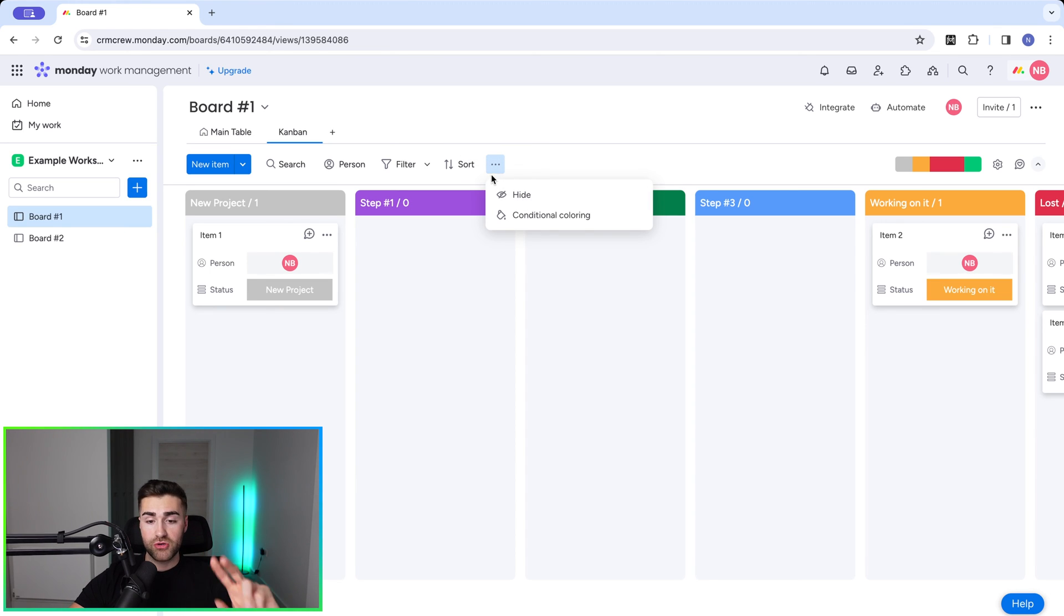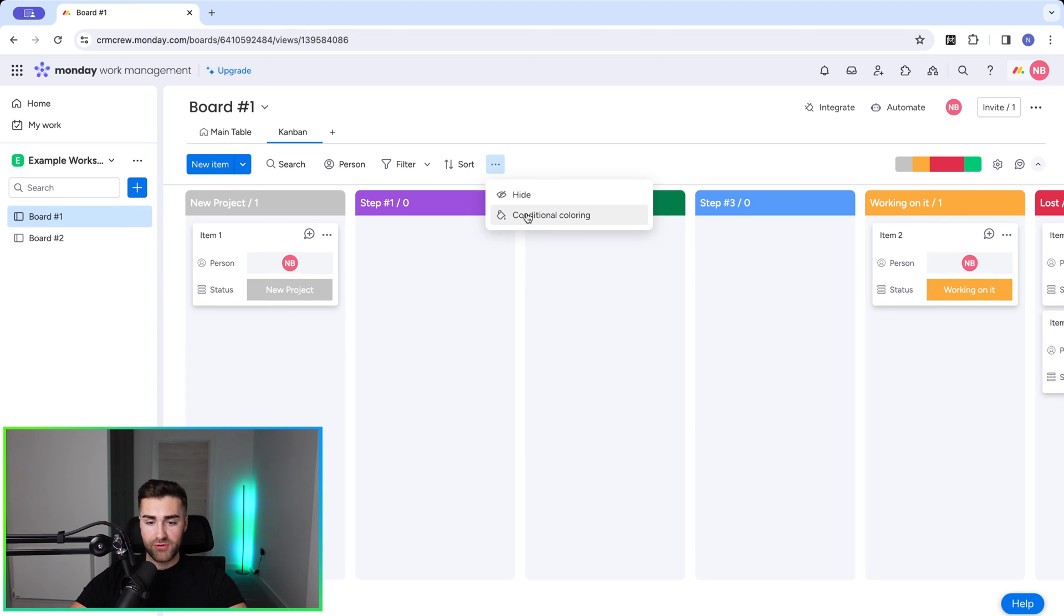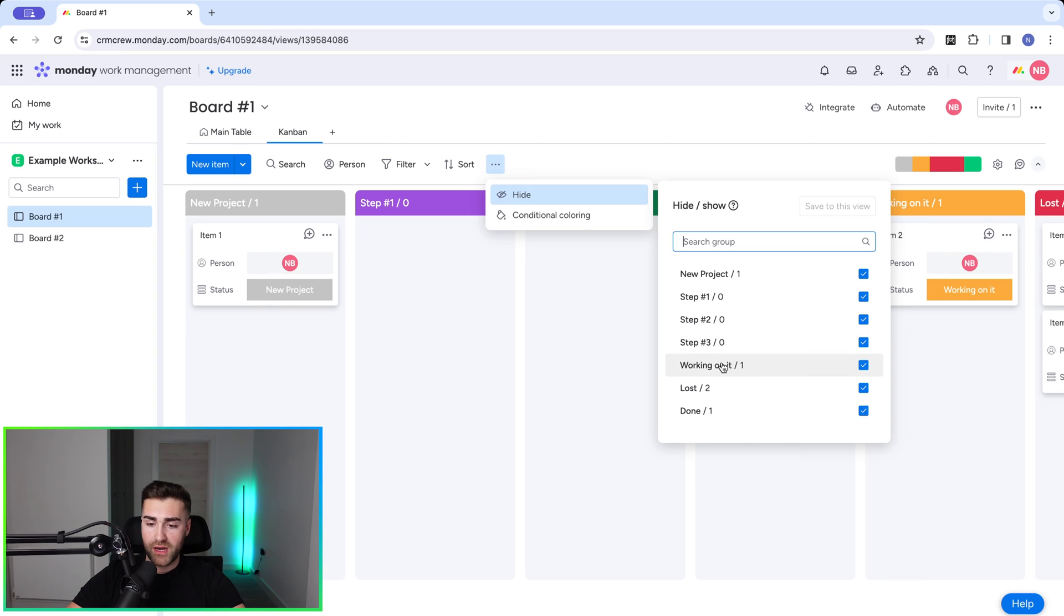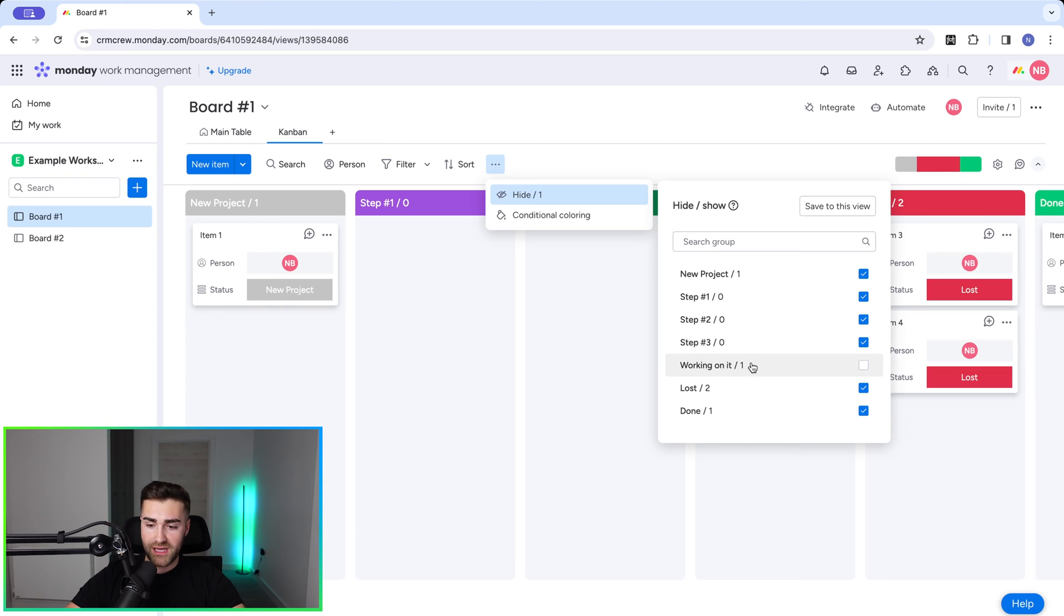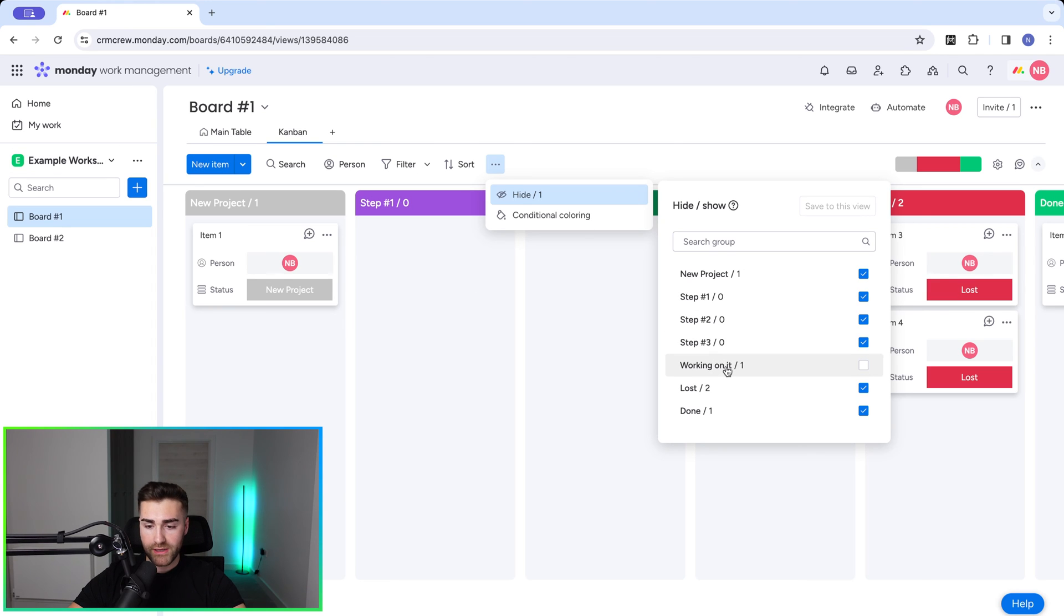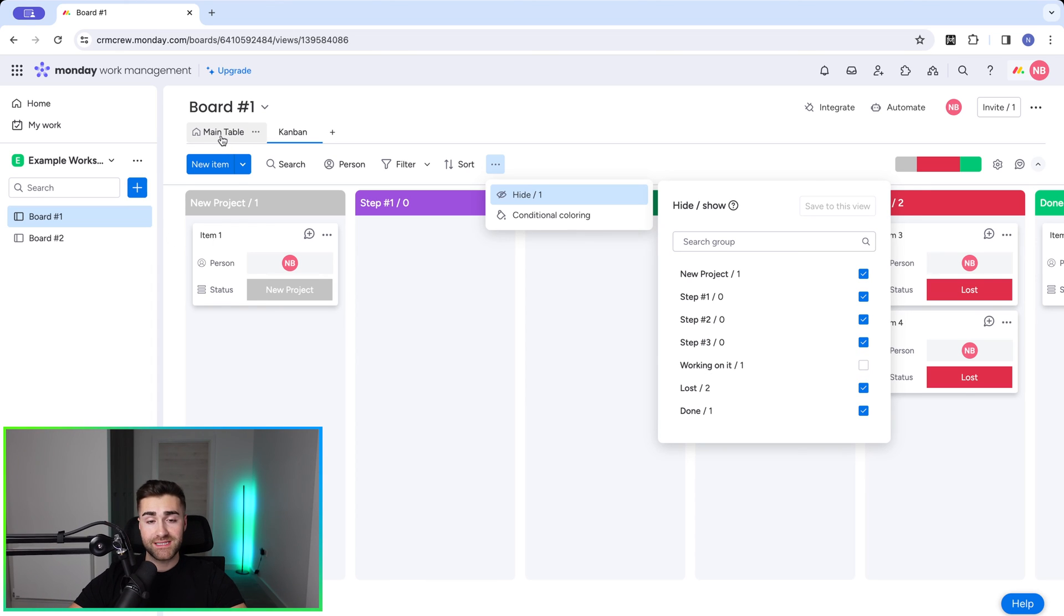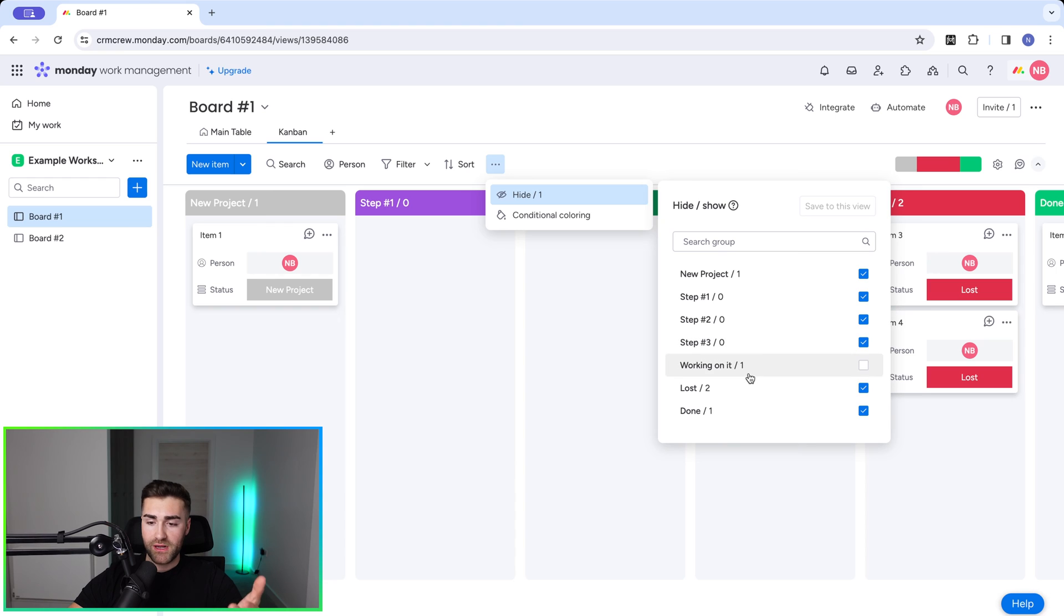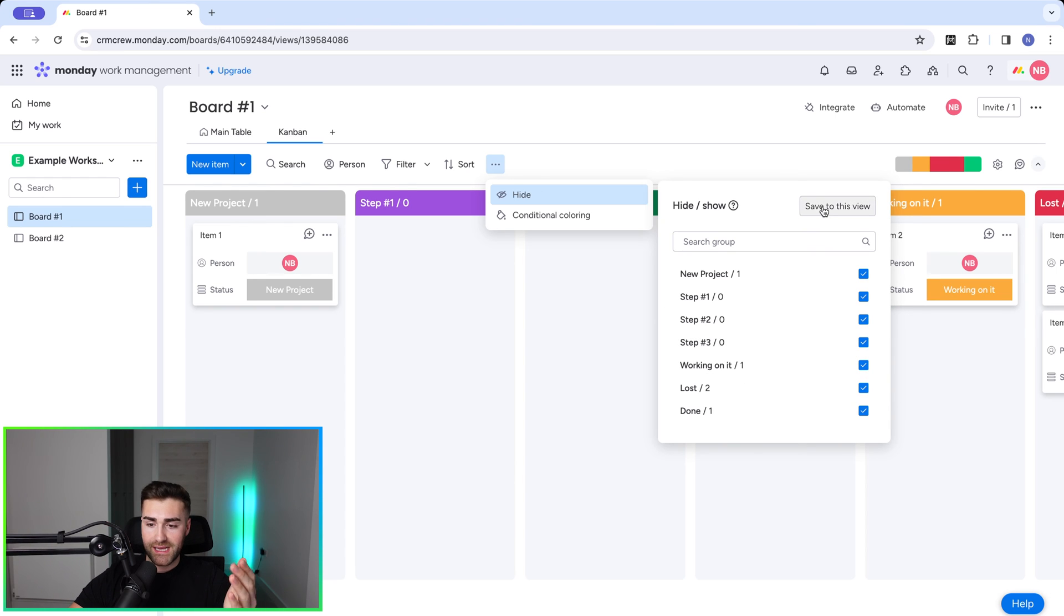So if we would like to hide a particular status option, let's say we want to hide working on it, all we need to do is untick that option and then go ahead and press save to this view. So every time you come back to the Kanban view, the working on it status option will not be visible from the Kanban view. Of course, it still exists on the main table, but on the Kanban view, it does not exist. If I'd like to add it back, you can go ahead and just tick it again and select save to this view.